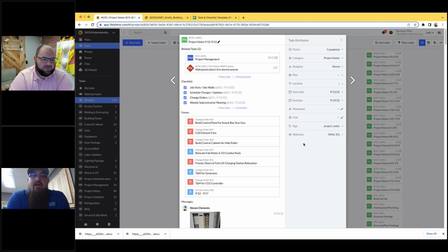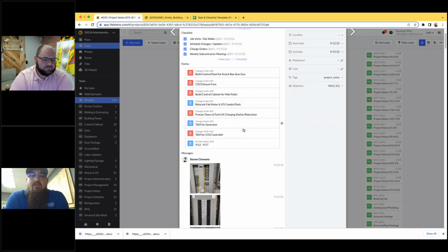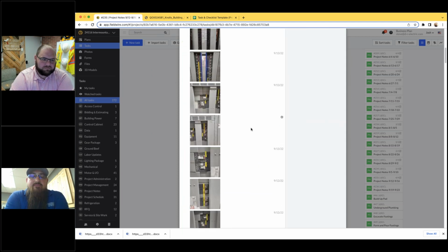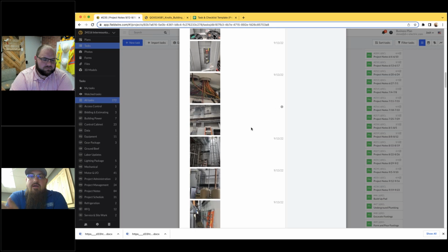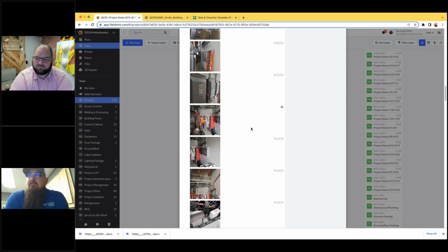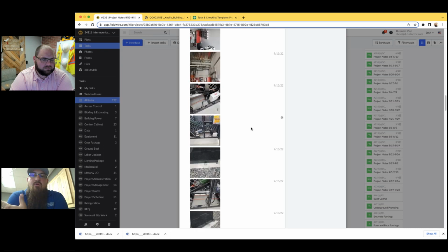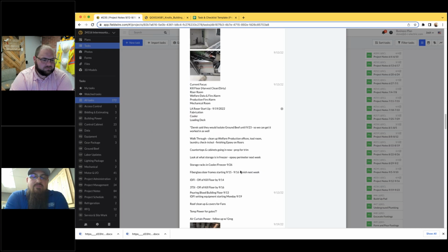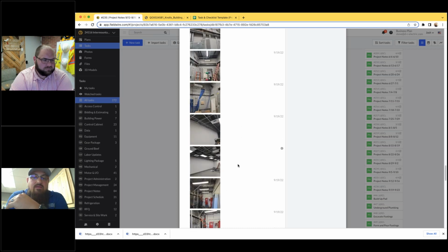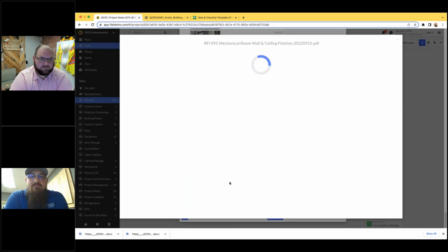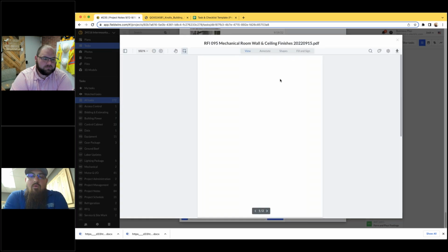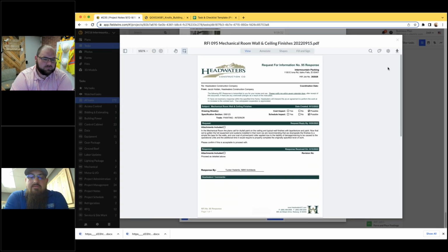Yep. So every Monday we send our general contractor a copy of the last week's project notes. Contains project progress photos, current focus, change orders, safety forms, and any RFIs or changes like red lines. So down here you can see our current focus and just the different things that have happened throughout the week that need to be communicated with the general. So they get a copy of it every Monday, and then any RFIs that we get from them, we incorporate that so they know we're seeing it and we're covering anything that comes up.